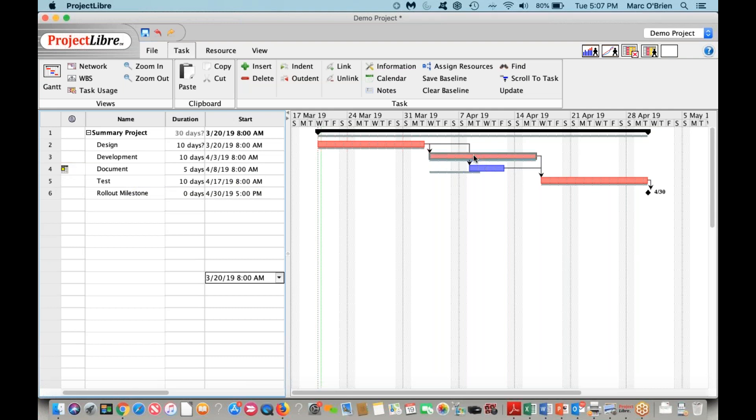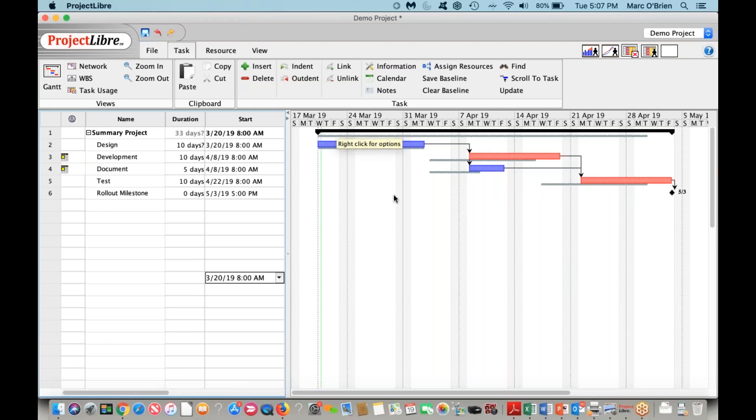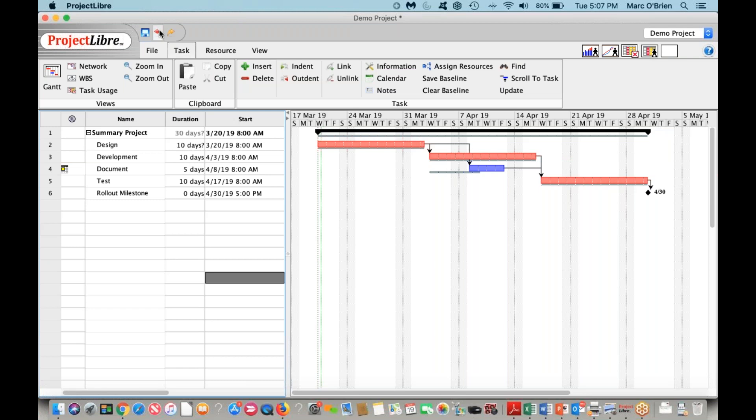If we were to move a critical path task, you can see that the milestone has now changed. If on any of these things you want to go back, we have undo and redo. I can click this red button, and you can see that the task has moved back. I can hit undo again, and we're back at our initial state.